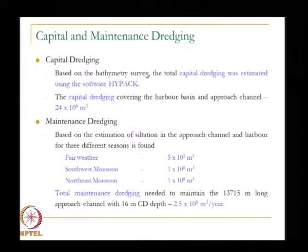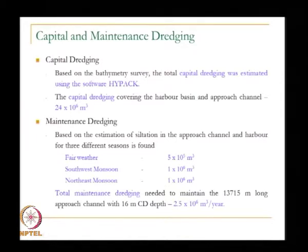First, we have to carry out a bathymetric survey and find out the required width of the channel. The channel length is 13 kilometers because natural depth of 16 meters is only available at that distance offshore. This is not an ideal location for a port — typically the 16-meter contour should be available within about 2 kilometers, whereas here it is 13 kilometers. This project is located at this place because the power plant is nearby and they already have permission for a power plant.